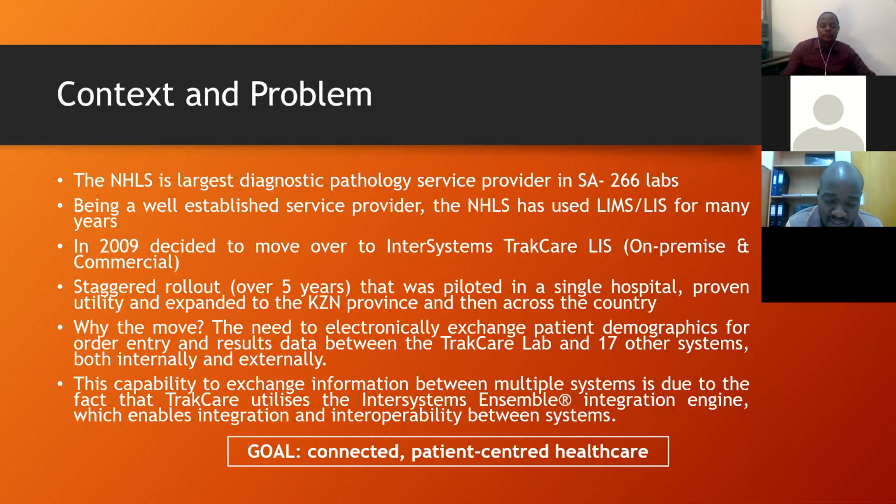When we did the implementation, we started with a pilot in a single hospital. So there was one laboratory at a hospital where we piloted the application. And then when the application was evaluated and signed off, we expanded to the rest of the province where we started. We've got 10 provinces in the country. It took us 5 years to roll out to all the 266 laboratories across the country. So you can imagine how big this implementation was.